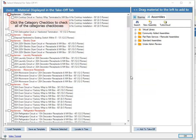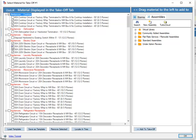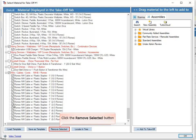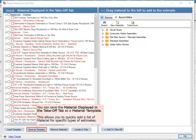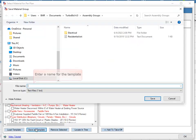Click the Category checkbox to check all of the category's checkboxes. Uncheck any items or assemblies that you want to be displayed in the Takeoff tab. Click the Remove Selected button. You can save the material displayed in the Takeoff tab as a material template — this allows you to quickly add a list of material for specific types of estimates. Click the Save as Template button, enter a name for the template, then click the Save button.